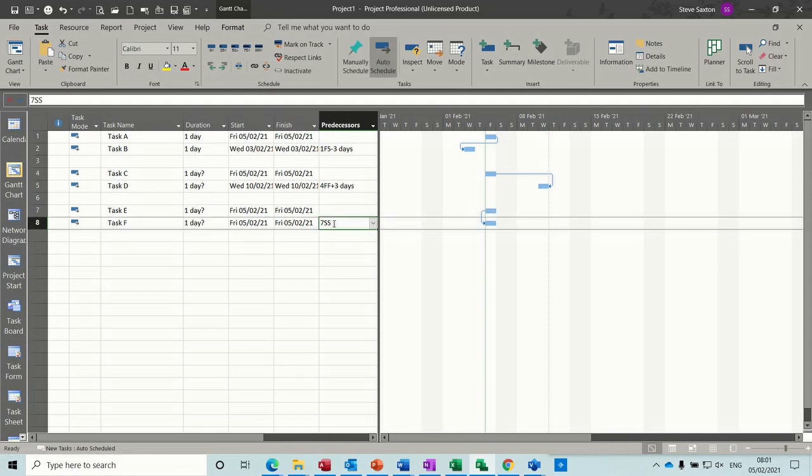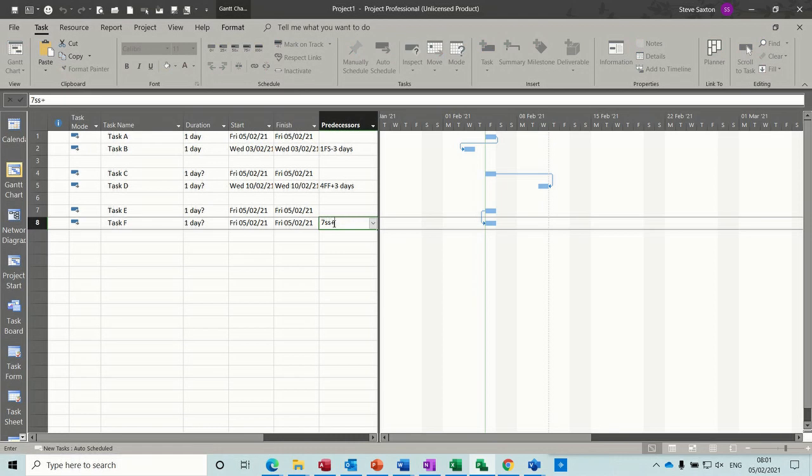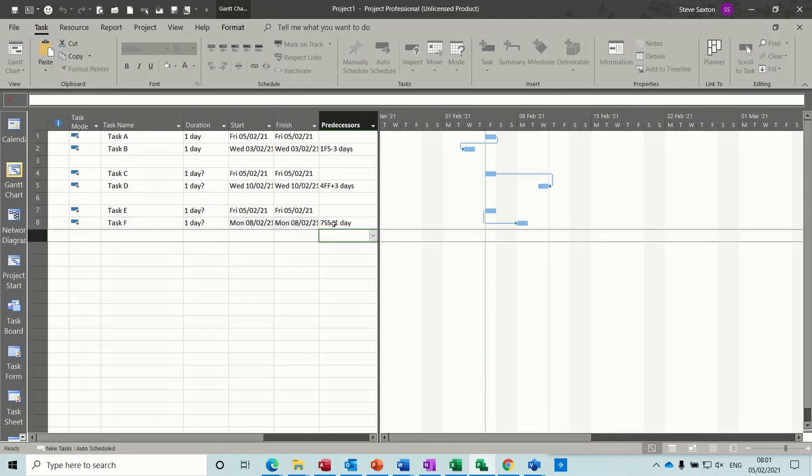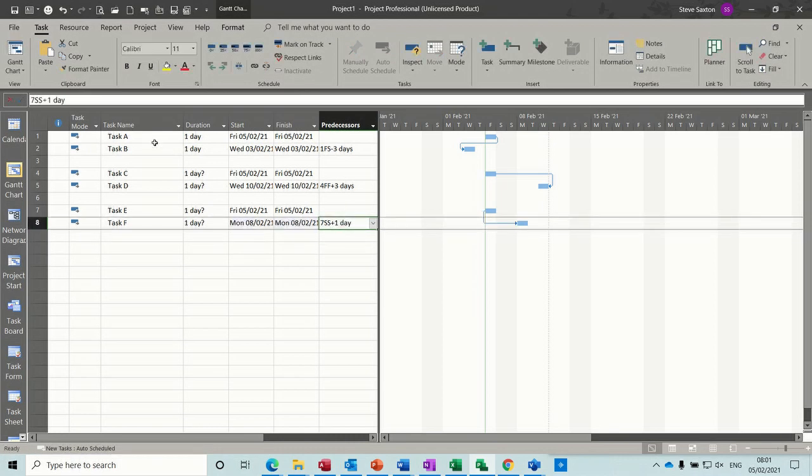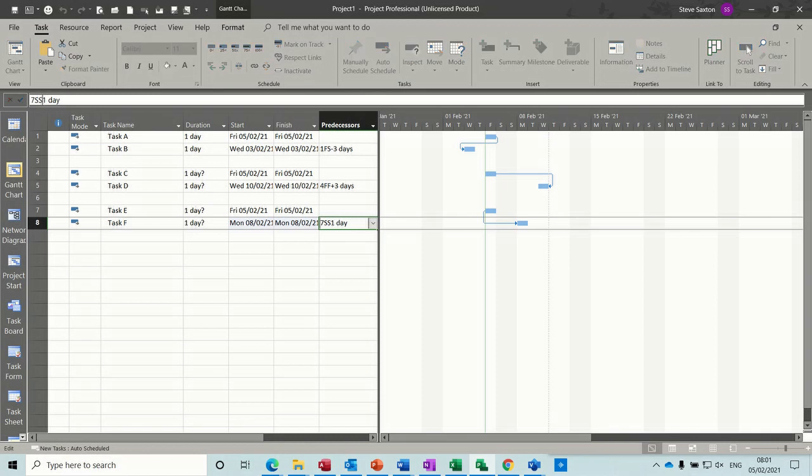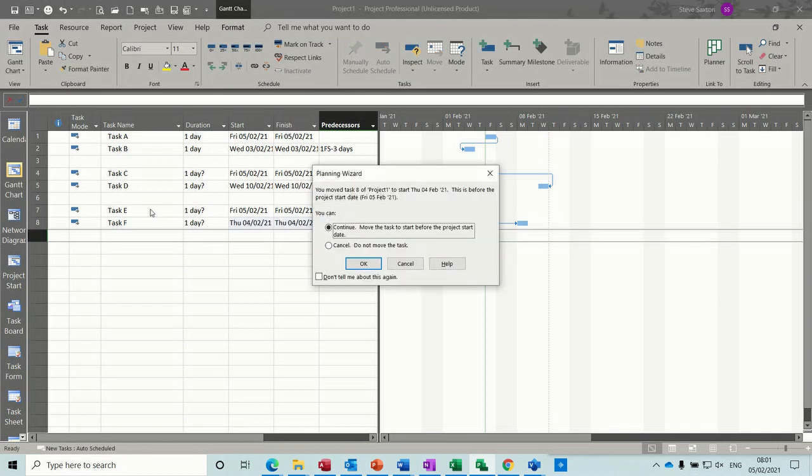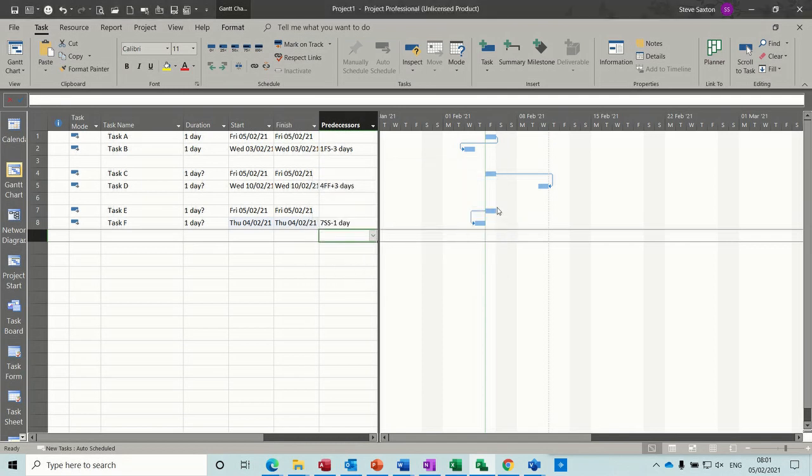So if I do a 7SS plus 1, that gives you the lag. If I go up there and put minus 1, it's doing that.